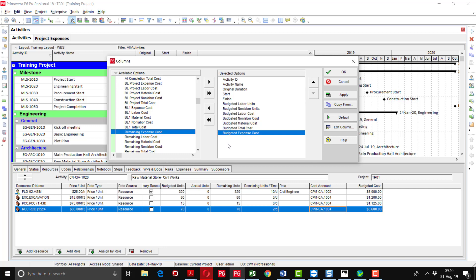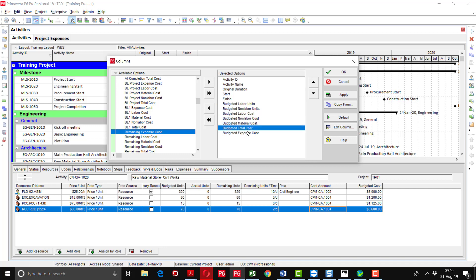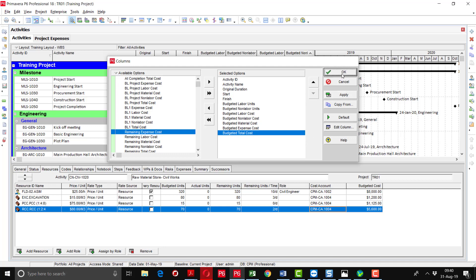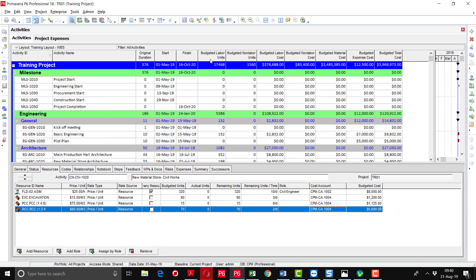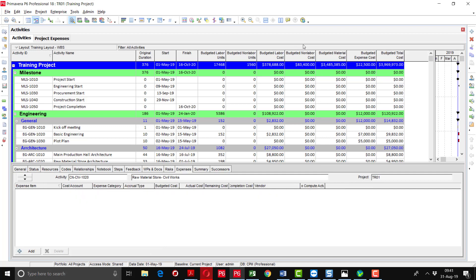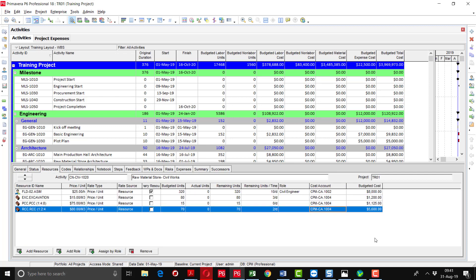We can also see the expenses which we have assigned to some of the activities. After applying, you can see that at the top the total man hours are showing as 17,468. Non-labor units are 1,560. The cost associated with labor units is 378,000. Non-labor cost is 83,000 dollars. Budgeted material cost is 3.4 million. Expense cost assigned via the expenses tab is showing at the top as well. This total cost includes the cost of labor, non-labor, material, and expense. If you add manually, you can verify the total project cost shown at the top.